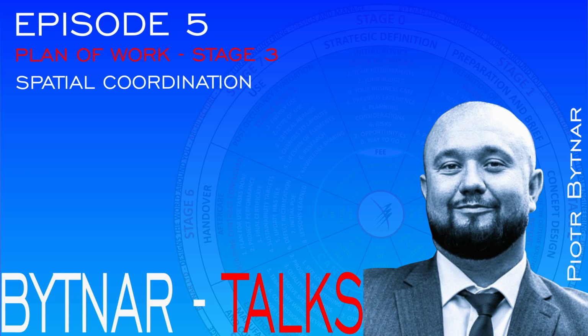And one of the other points to consider within that stage is preparing the project for planning application. So that's point 2, preparation for planning application. It is a pivotal objective of stage 3. The pivotal objective of stage 3 is to prepare the design for the planning application process, making sure the threshold of required information is reached and that the building will not require substantial redesign, if any at all, at the later stage.